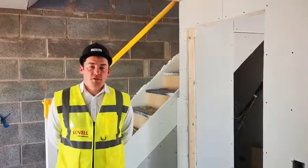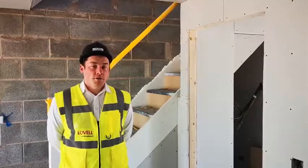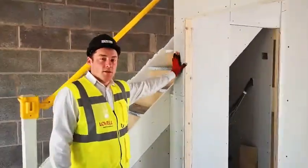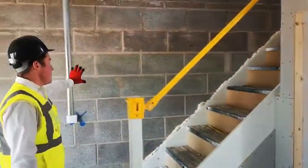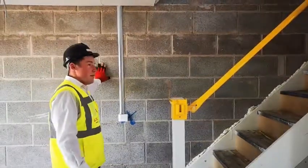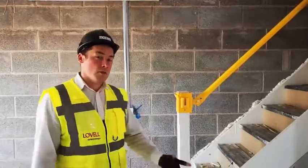Okay, so once the first fix is complete, we're now on to the plastering stage. This is part one of two plastering. Basically, internal walls get plasterboard covered on top with screws to fix them. Then the block work will have plasterboard as well, stuck on with an adhesive, ready for the next stage, which is skimming, where it gets covered in a thin coat of plaster, which you'll see on the next video.